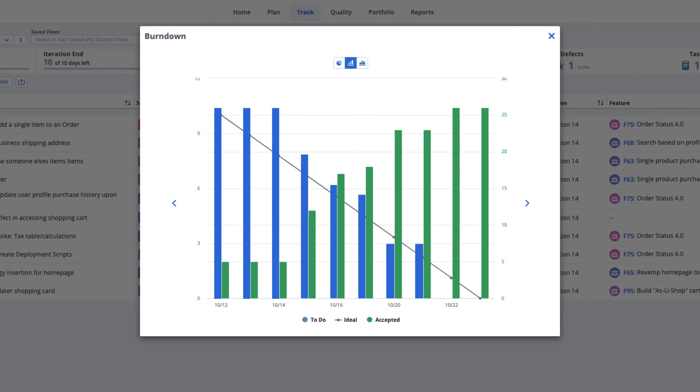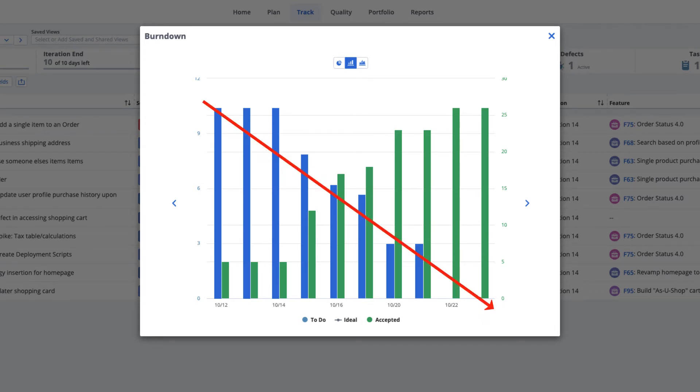The burndown chart shows amounts of work accepted and amounts of work remaining. The ideal line on this chart represents the pace you'd like to see your teams follow as the to-dos from the task hours go down and the accepted story points go up.